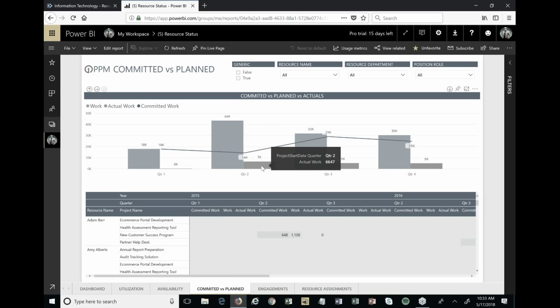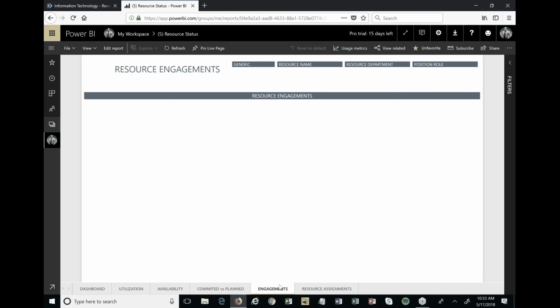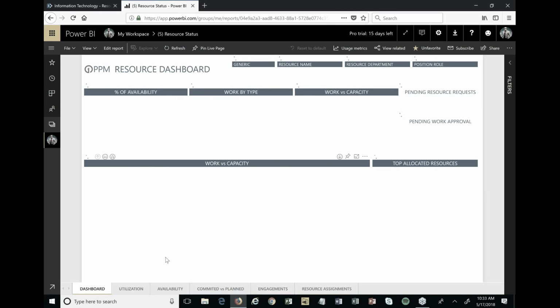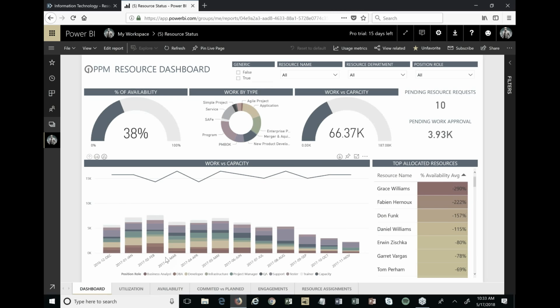Later on, we put actual work in. So these are timesheet hours, basically, or actual hours. These could be rolling in from a different system, like a financial or other timesheet system you might be utilizing. Roll that all together so then we can see how that all lines up. Budgets, plan versus forecast versus actuals, basically. There are other reports in here. I won't go through all of them today, but we can look at this in lots of different ways and get visibility into what's going on, whether we're putting the resources on the right things, where the problems are, whether we're utilizing them, et cetera.